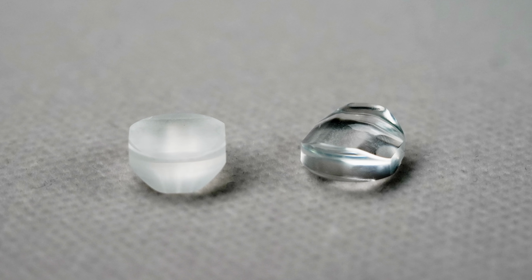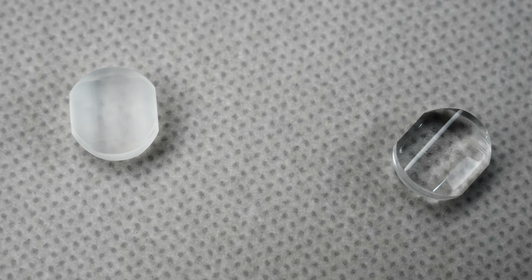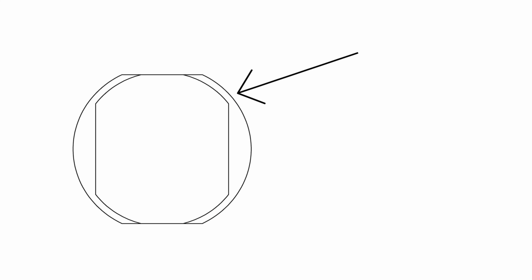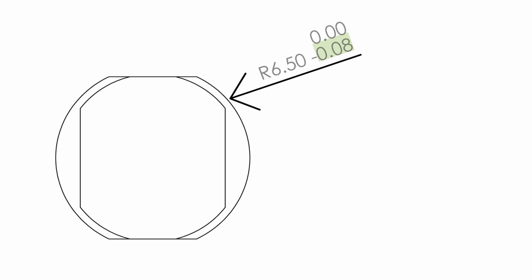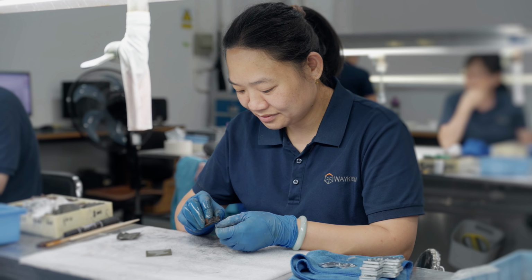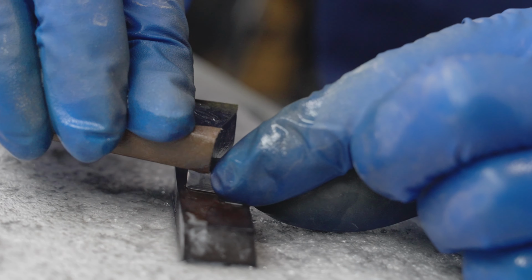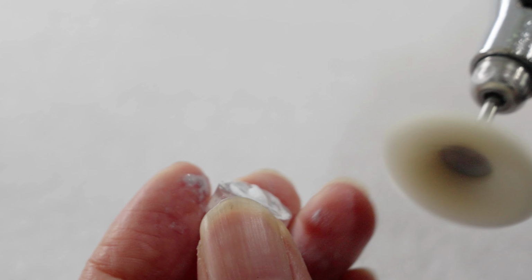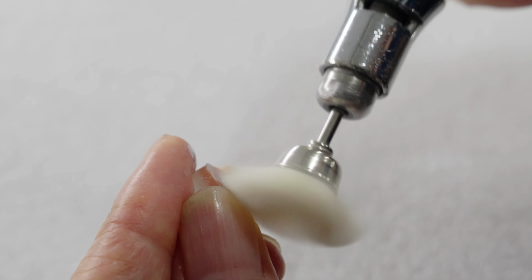The following example is from a recent project. We had to produce optical lenses made of transparent acrylic. After the production of this project was confirmed, the designer updated the 2D drawing with some additional tolerances. However, due to the involvement of a lot of manual polishing operations in the production process, it was impossible to achieve the precision specified in the drawing on some of the side surfaces. We proposed a solution during the review phase to ensure high precision on the side surfaces by suggesting the use of fine CNC machining instead of manual polishing. This was necessary to guarantee the important dimensions of the component.